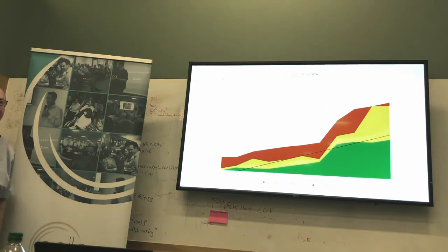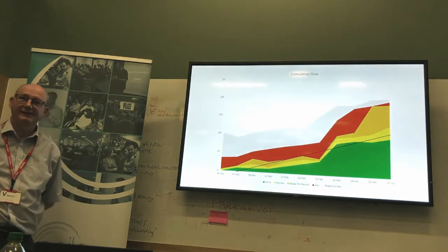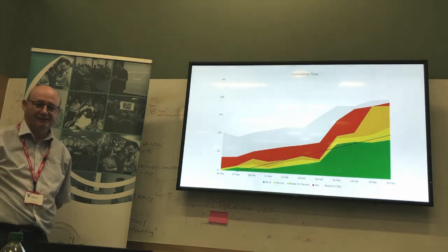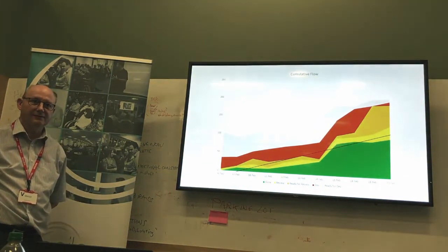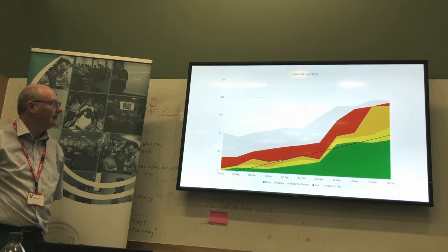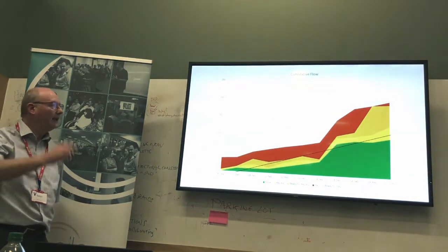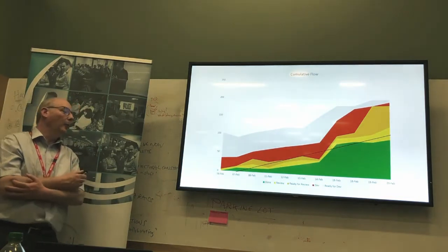So John, on this one, if they had de-scoped some of the existing work as new work came in, it's probably a bit late in the sprint by the time it came in, but if they had done that as they went along, it would have masked the increase in scope. It would have gone up a little bit, but it could have been flat. That's something you can do when you're operating sprints.